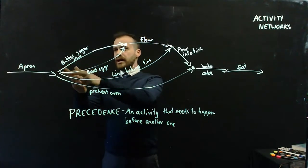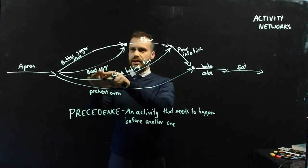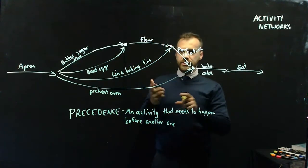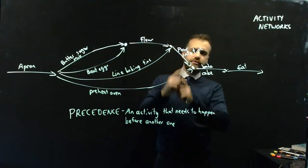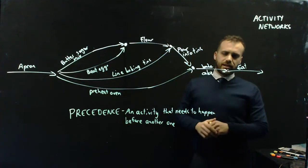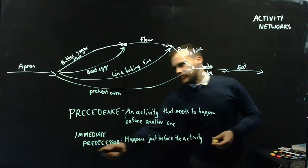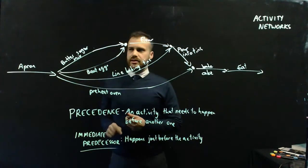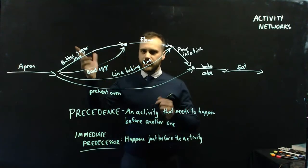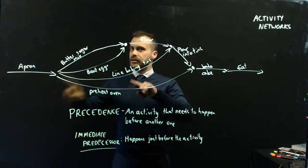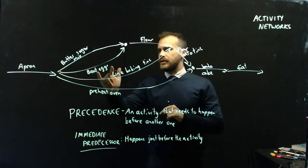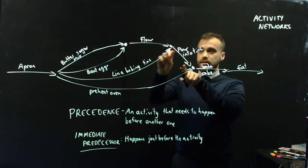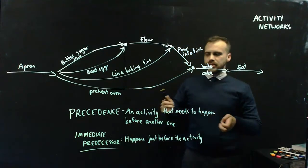Butter, sugar, mixing the butter and the sugar, and beating the eggs both have precedence over adding the flour. Adding the flour has precedence over pouring into tins, and so does lining the baking tins. All of those things have precedence over baking the cake and eating. That leads us to something called an immediate predecessor, and that happens just before an activity. Each of these is an activity. Apron is an immediate predecessor to butter, sugar mix. Apron is a predecessor to flour, but it is not an immediate predecessor. Butter, sugar mix and beat eggs are both immediate predecessors to flour. Pour into tins has two immediate predecessors, flour and lined baking tins.